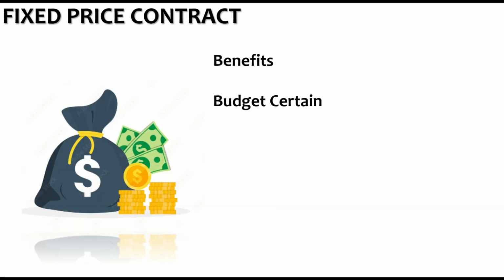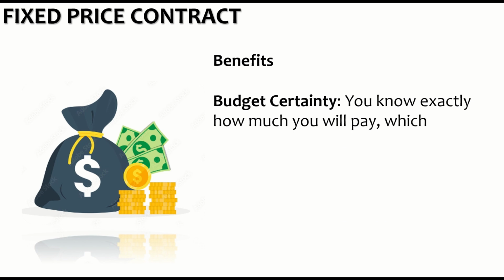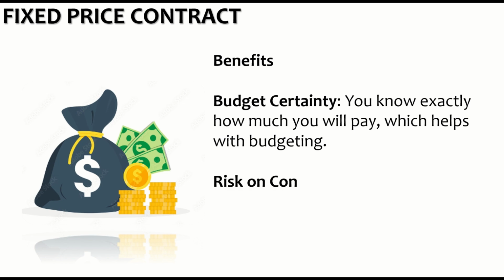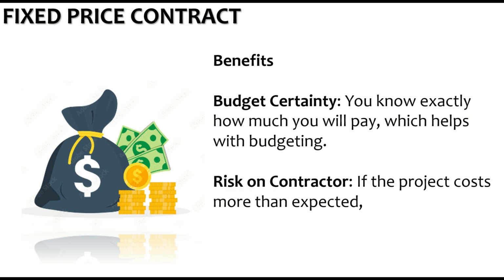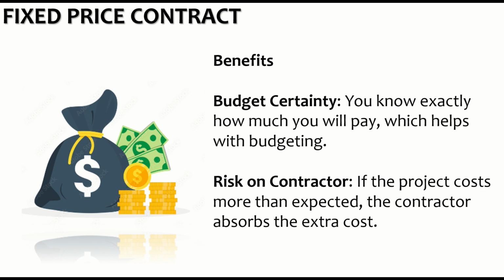The benefit is that the budget is certain. You know exactly how much you will pay as a client, which helps you with budgeting. The risk is on the contractor. If the project cost is more than expected, the contractor absorbs the extra cost with no cost increase to the client.